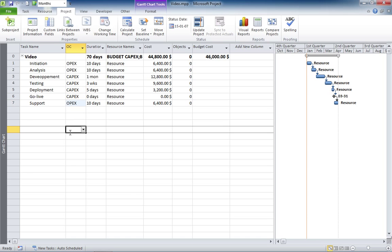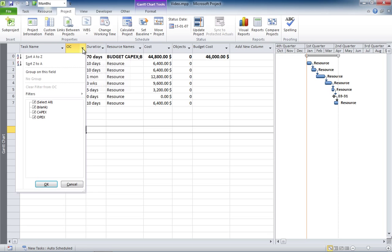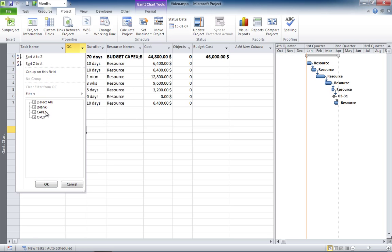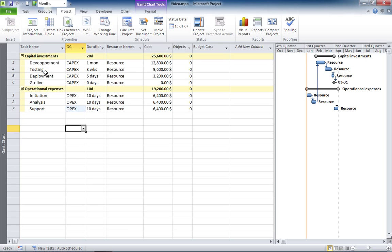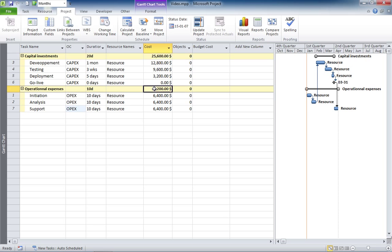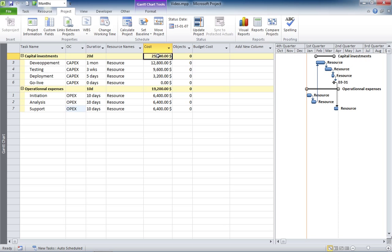Now, what you can do is that you can group by this field and see the plan cost for the CAPEX and the plan cost for the OPEX. But the problem with this view is that you've lost the sight of your budget. You don't know to which number to compare this.